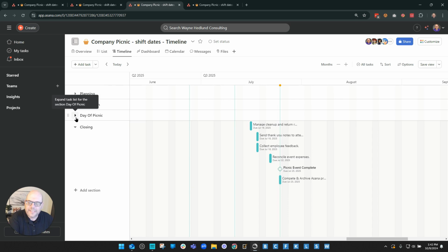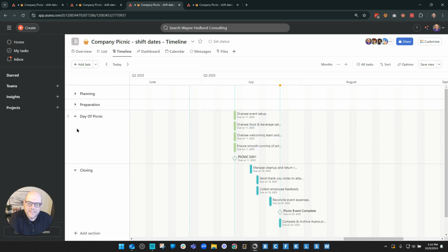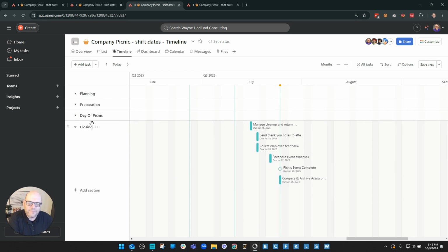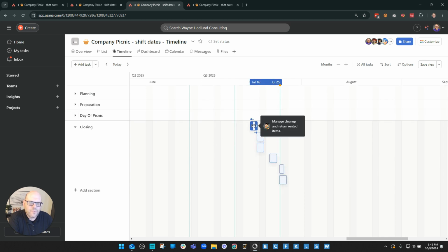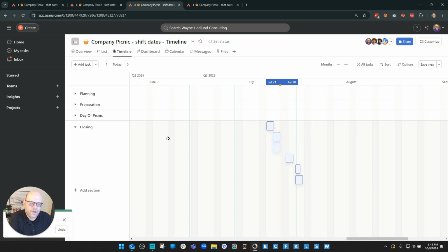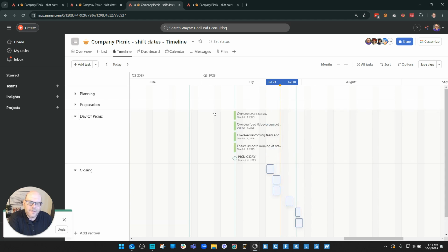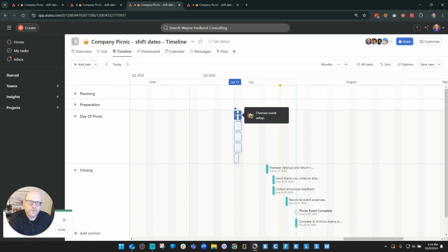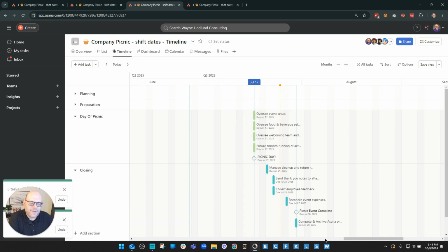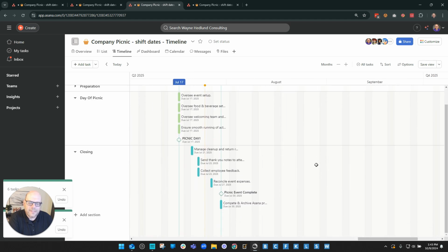So another approach is to start at the end. In this particular case, especially if I'm moving the tasks forward, then I would probably want to start at the end, drag and drop these tasks. And I'm going to have to count. But if it's a short number, if it's just like 5 days, I can go 16, 17, 18, 19, 20, 21. I move them all 5 days. Then I jump over here and I can highlight these and move them all 1, 2, 3, 4, 5. Okay. If I'm moving them more than 5 days, it's going to be a little more challenging.